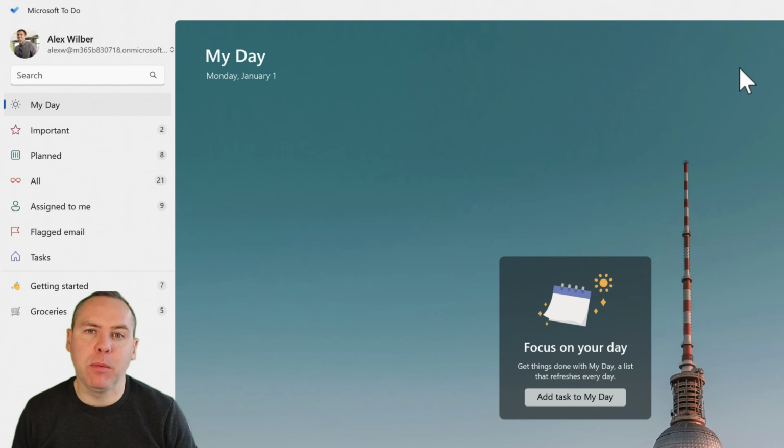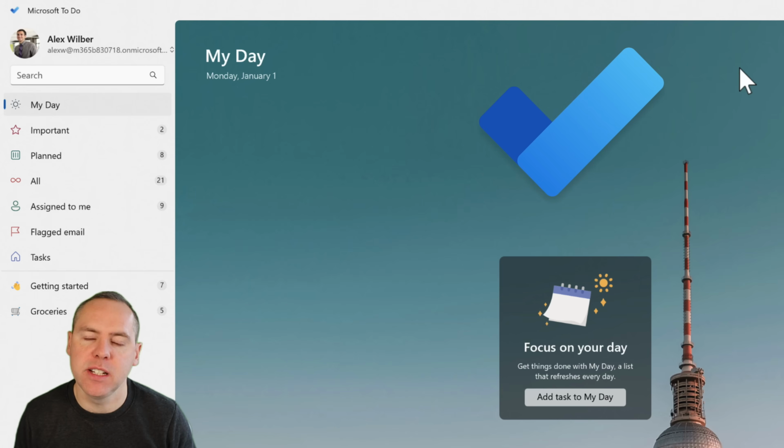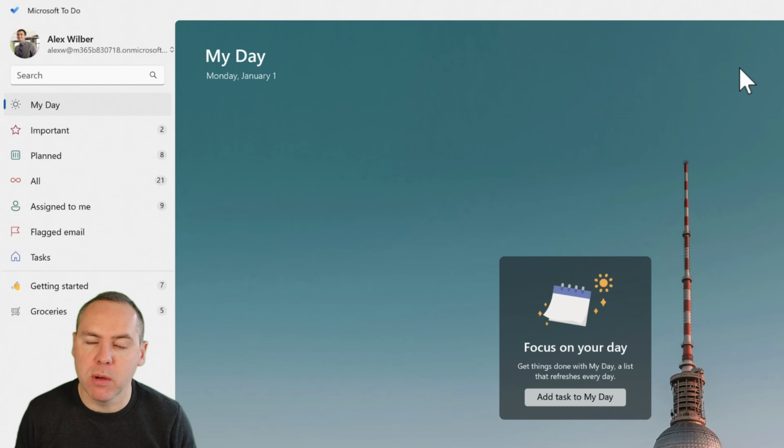So what's one thing that we all hate to do on projects? That's chase people up when things become overdue. And it's very simple in Planner to manage tasks and to ensure that your team can access their tasks quickly without you sending notification emails or even Teams messages. Yes, any task that we create inside a Planner is synced into Microsoft To Do. If you have your team install it on their computer or their mobile device, any of the tasks you've assigned will then appear in their to-do list.